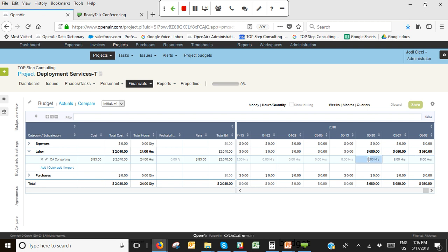The budget itself gives you the ability to put the hours plan in, factor a cost in there, and now you have a cost that you're showing the burn of that hours, the burn of that cost, which can actually give you a baseline to compute your own earned value, because as you're planning out costs, what's your actual cost, and then the calculations I'm going to show you coming up for EVM, you can actually write your own custom calculations, but not use the EVM feature in OpenAir.